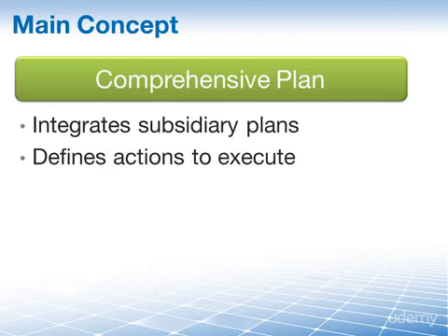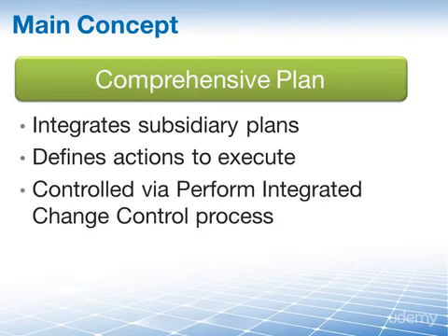You define all the actions that are needed to execute these plans. By extension, this means once the project management plan is established, including the details of what and how things are to be executed, it is approved and controlled via change control. That process, the Perform Integrated Change Control process, we're going to discuss later on here in the Integration Management Knowledge Area lessons, but simply put, Perform Integrated Change Control defines how changes to your project are documented, approved, and